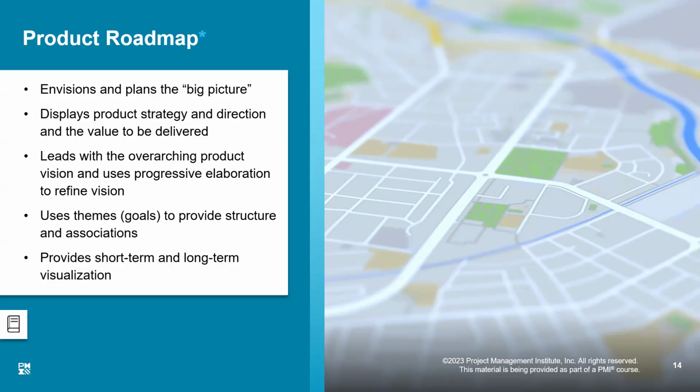Moreover, while we create our product roadmap, we also decide how many releases there are going to be and what the size of our iteration should be. We have to decide on one size. Say you have decided it should be 2 weeks long. So no matter how complex the project is, we will work in iterations of 2 weeks continuously, one after the other.